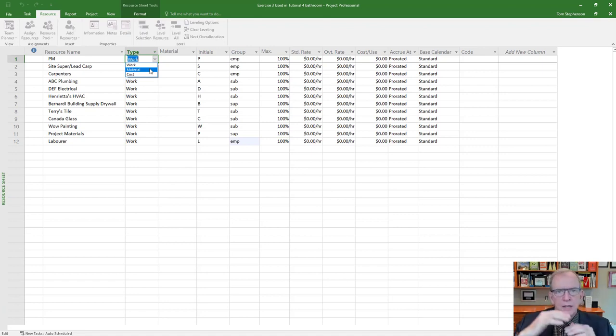Well, you don't really want to list out all the materials, and that's not really where I would put it anyways. Material would be more something that would be measurable. Something like in construction, linear feet, square feet, cubic yards or cubic meters, or something that's of measurement that you want to put in there.